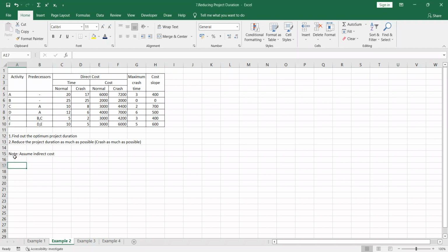Right. So as the next step, you have to draw the project network. I am suggesting you to use the activity on arrow approach. When you are drawing the activity on arrow approach, you have to use your node as a circle and use the arrow for the activity.